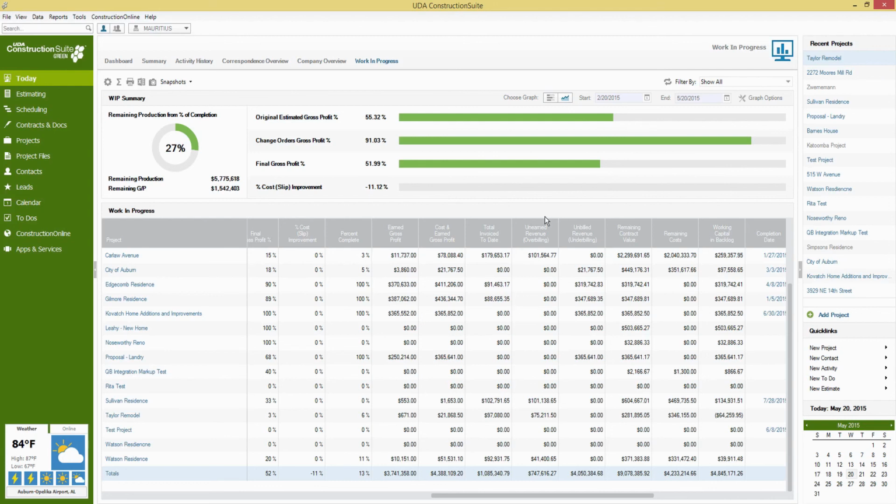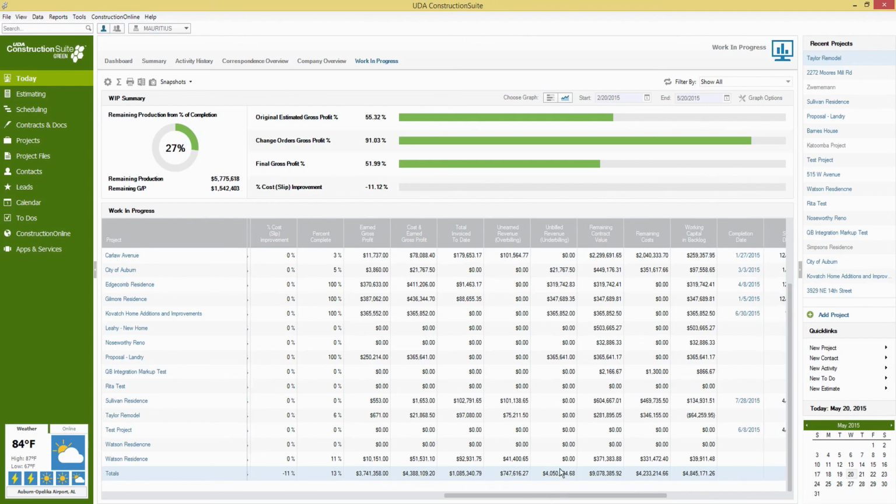Especially useful if you receive upfront deposits or stage payments that aren't necessarily valued based on the work that's actually been completed. Here you can see what the inflows have been that you haven't really earned. So it's almost in one respect a measure of how much work you still have to do for free, which obviously you want to keep this number down as much as possible. There are certain circumstances where getting that deposit up front really helps you with the cash flow from other projects. But that's where these totals really come into play: you can see what the overall position is and what your cash flows are expected to be.